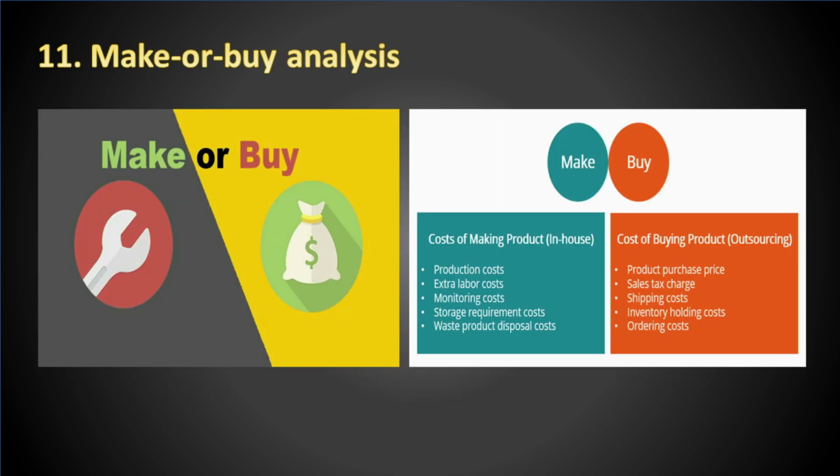Make or buy analysis. This is a technique used in the plan procurement management process to decide which aspects of the project should be outsourced and which should be made in-house. This is typically used in conjunction with cost-benefit analysis for making objective decisions.